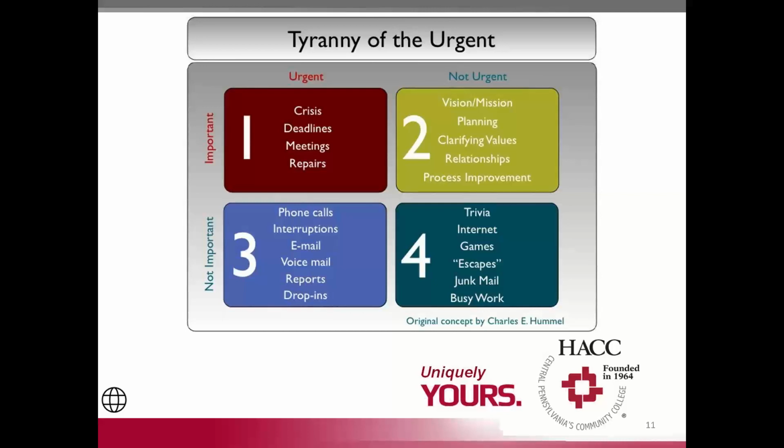Our branch chief that we worked with had an issue. He had a FUSRAP project, a radiological project that was having some issues. It was basically a rub between the construction contractor and the district, but it hadn't broken down too far. All I had to do was listen to a couple of their progress meetings. I just did a case study. I went and did a site visit, listened to what they were doing, listened to how they interacted, looked at how the superintendent interacted with the QC or the QA on the ground, and observed for about 1 to 2 days. Then I broke folks down and did individual interviews so that I got perspectives of everyone. And it didn't take very long.